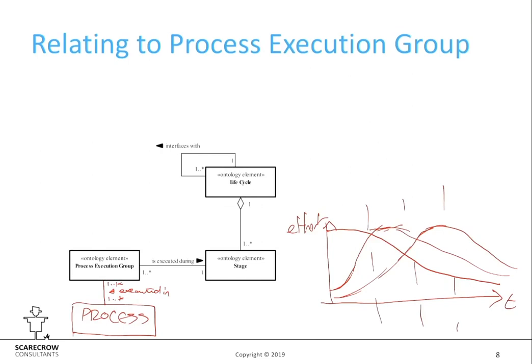It's trying to get away from the classic mistake in project management, with Gantt charts that still get produced, where people use a life cycle, create a life cycle model, which we're going to come on to next, and it's a waterfall thing, and they say, okay, we're going to spend 6 months doing requirements and 6 months doing design and 12 months doing implementation. The reality is none of us actually work like that. In that initial stage, you're going to be doing some requirements, some analysis, and some design.